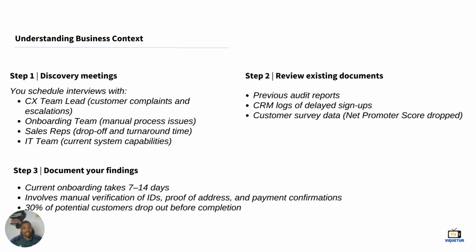In fact, this takes 5 days. You document it. From what I've seen so far, what I've heard, 30% of our customers drop out before being completely onboarded because of this lengthy process. You document that as well. Then you send these documentations to your stakeholders.